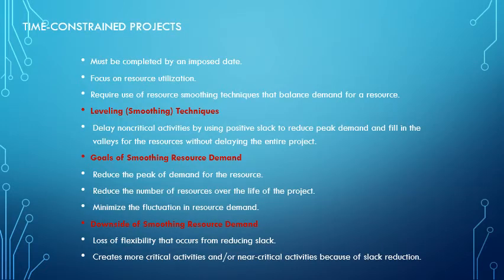Time constrained projects. So we could be resource constrained, now we're time constrained. We're going to do it to whatever time we're told. Focus on the resource utilization and making the most of it. We're going to try and level and smooth activities where we can, to make sure that we're using the resources that we have available. The goal of smoothing resource demand: reduce the peak of demand for the resource, reduce the number of resources over the life of the project, and minimize the fluctuation in resource demand.